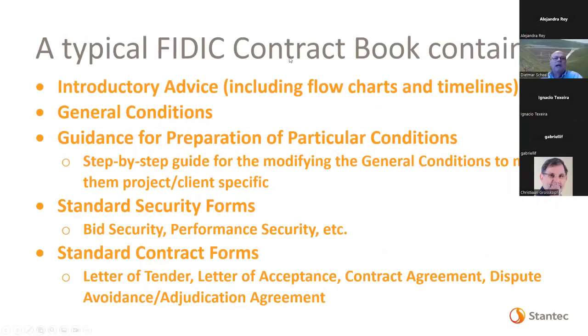Each of these FIDIC contract books, regardless of color, it's not just the general conditions, but they actually show you how to implement these things. They're not going to show you how to do it for the sake of a specific project. And powerhouse rehabilitation projects have their own specific needs that will need to inform the particular conditions which supplement the general conditions.